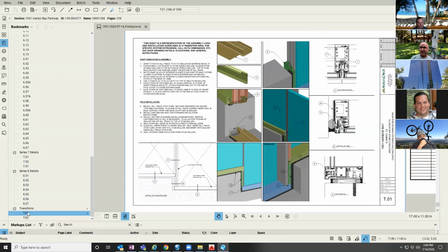In previous versions of shop drawings, you might get a transition occurring, but a lot of times it fell upon the fab team to figure out how to make the connections and make the parts work together. That was too much of a burden on that last process before it got out to the shop floor. So that process was moved up to the front, and now there's a team that does that work, and they build the transitions first.